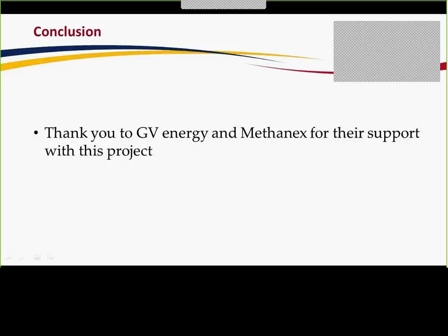So we would essentially need to be going to vendors for getting accurate quotes simply because the size of this plant is much smaller than any of the costing tools that we have is able to account for. But we do have equipment quotes for the storage tanks. Correct. And that's a big chunk of the capital, right? Yeah. About 25% of the capital we have quotes for. Any other questions?